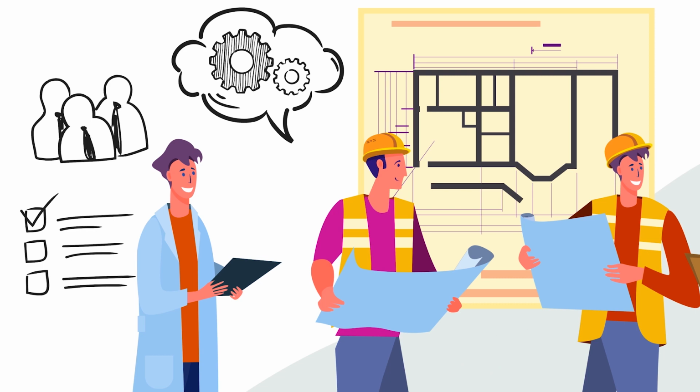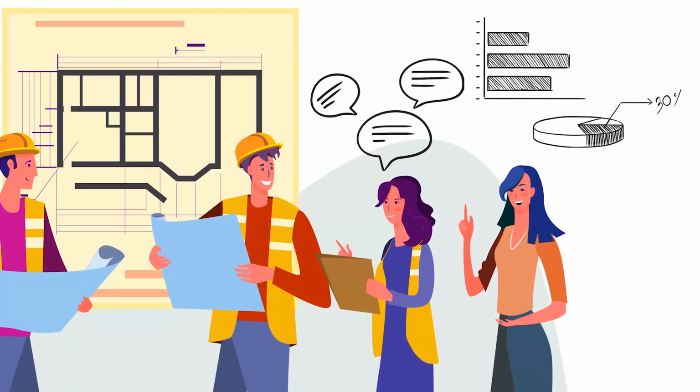It should also evaluate their progress by calculating their percent plan complete. And if they have uncompleted work, what are the recovery plans to stay on schedule? Do they have a workable backlog that can be completed earlier without affecting other work?